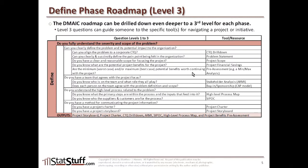Then ask yourself: Are the minimum — that is, the worst case — or the maximum — that is, the best case — potential benefits worth continuing with the project? If you're not sure or don't know how to do that, refer to the project pre-assessment or a min-max analysis to help you. The idea here is that once you can answer all these questions at this third, deepest level, that should help you in answering the question above it: Can you clearly define the problem and its potential impact to the organization?